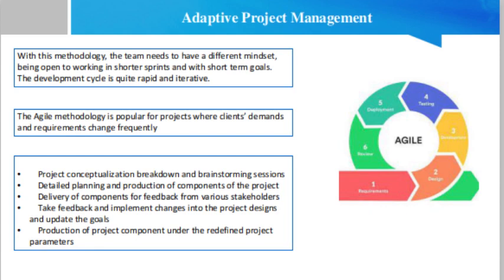In some cases, a combination of methodologies with multiple milestones in the development journey are more suited. A stage gate process is typically employed in many product development organizations where a blend of both methodologies is efficiently deployed. A more agile approach during the ideation and validation phases, and a more structured approach in the execution and launch phases.